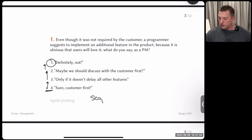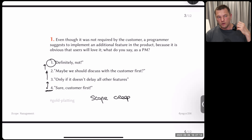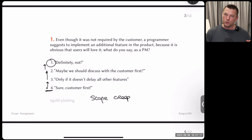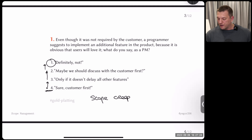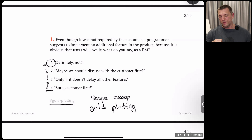This also leads to something called gold plating. Gold plating is a term that came to project management from manufacturing. Imagine you're making chairs — a customer asks for a simple wooden kitchen chair, and you deliver it covered in gold, telling them it will now cost half a million instead of a hundred dollars. You did the gold plating. You didn't ask for permission — you just felt the customer would be happy.